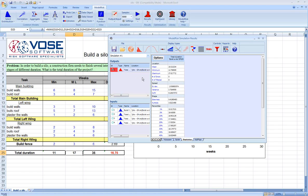When you do quantitative risk analysis, you can understand that it could be as high as 27 weeks, and that the average is actually going to be 19 weeks. In most cases, it's going to be higher than the most likely value.